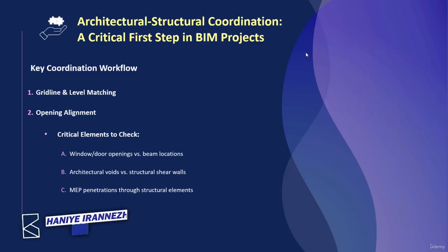One of the most important things you need to know when starting a project in structure and architecture is that, in a BIM project, when you receive the architectural and structural plans, a very important thing to do, and usually the coordinator does this, is to put the architecture and the structural plan on top of each other and report their interferences.